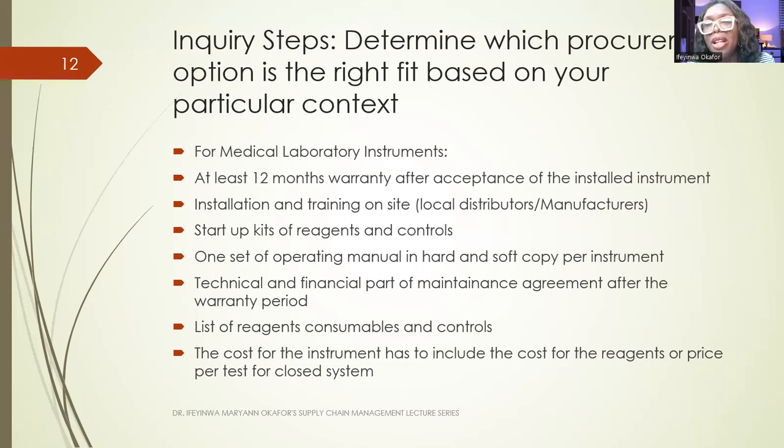At this stage of inquiry, you need to have an agreement with the clients. Be sure they are going to deliver in these areas. At least 12 months warranty after acceptance of the installed instruments. Number 2, installation and training on site.